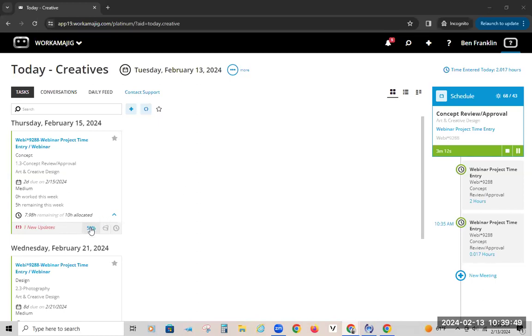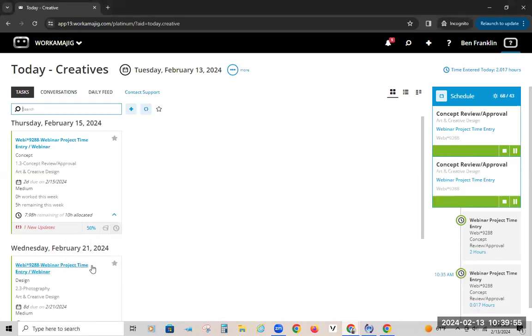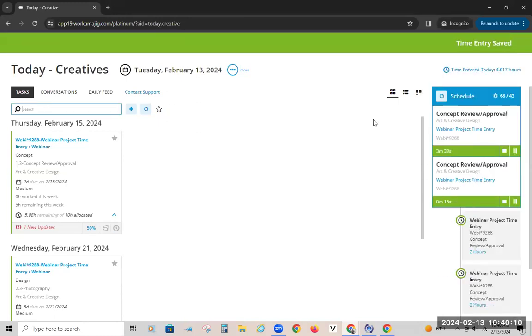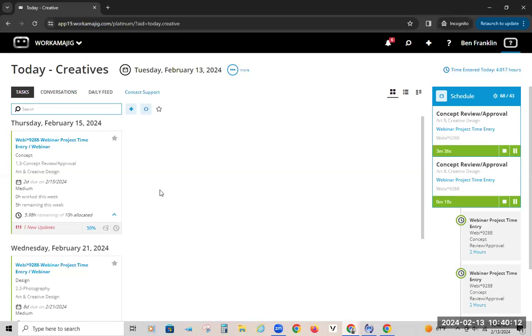Number two is if I do put 100% done, that is going to mark my portion of the task done. So it is the same as going in and, whoops, let me do that, and clicking the box to say I am done with this task. It's the same thing. The reason that we have this here is some people forget to check the box. So they might put in another 2 hours and they forgot to check the box. Well, they obviously don't want to have to put another time entry in order to then mark it done. So this would be that option.